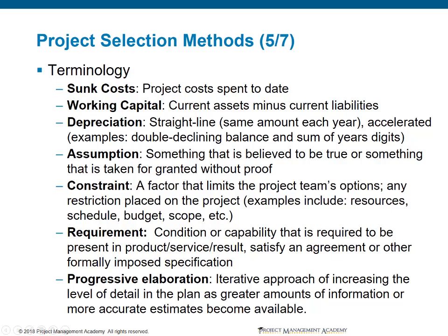Assumptions should be recorded in an assumptions log. An assumption is anything that we believe to be true or something that we're taking for granted without having some type of proof or evidence. For example, we may go ahead and assume that more funding will be available during the next fiscal year, even though that might be 10 months away.